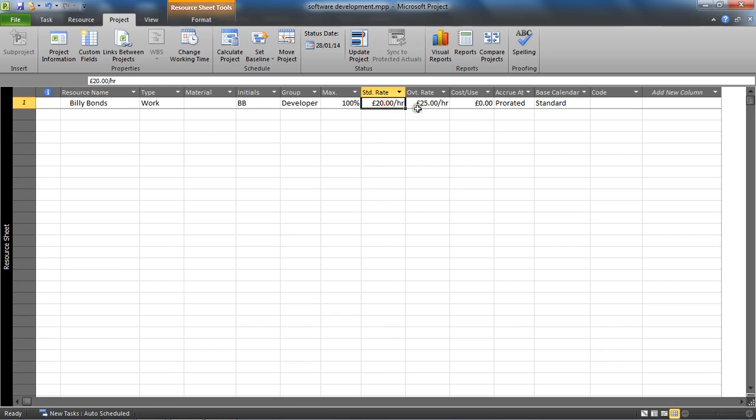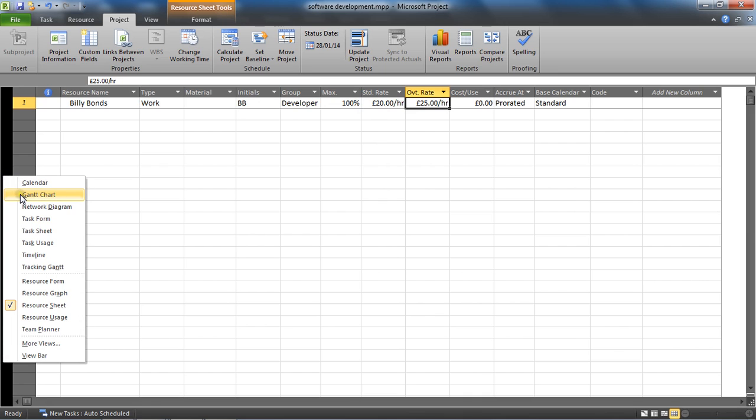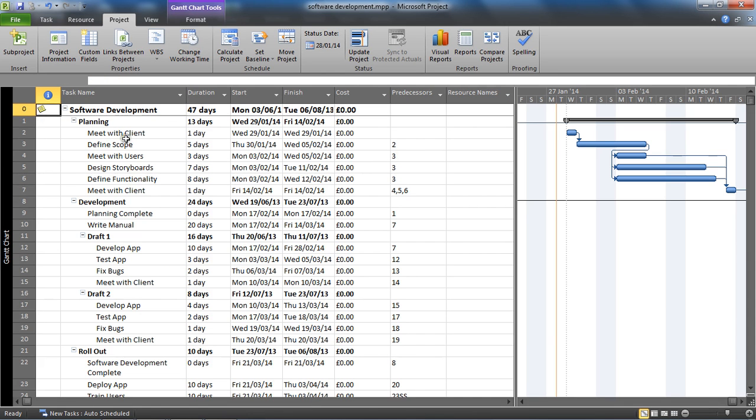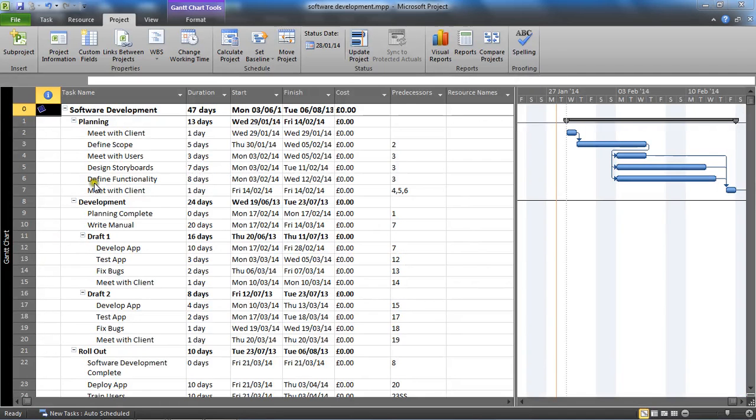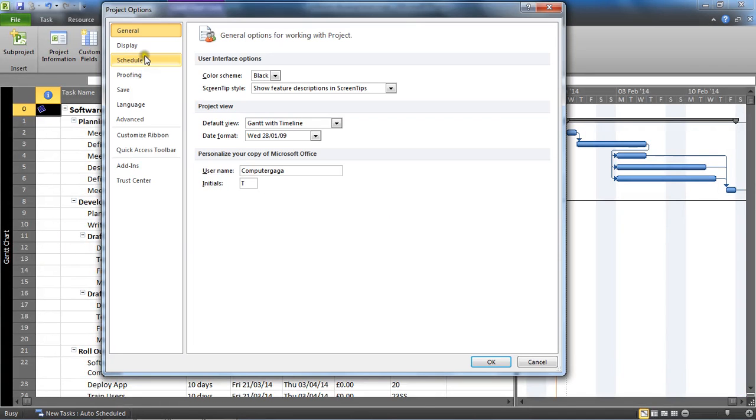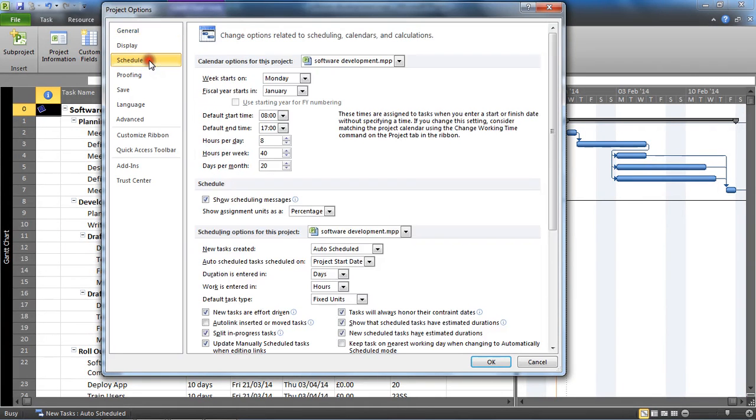He has a standard and overtime rate assigned of 20 pounds an hour standard rate and 25 pounds an hour overtime rate. I'm going to come back to my Gantt chart, and before I add Billy to that task and look at overtime hours, I want to show my schedule settings from options so that we can see that I've got an 8 hour day, 40 hour week going on here in my scheduling, and Billy uses that standard calendar.